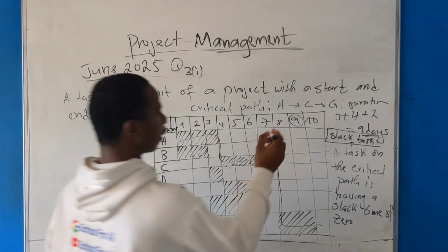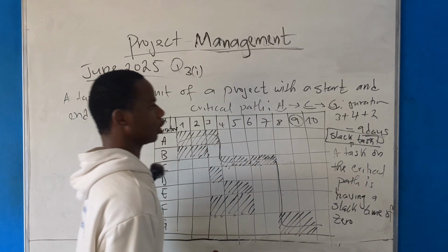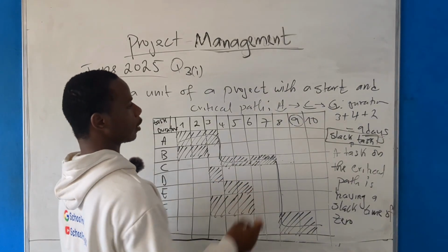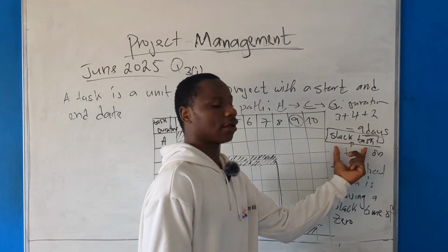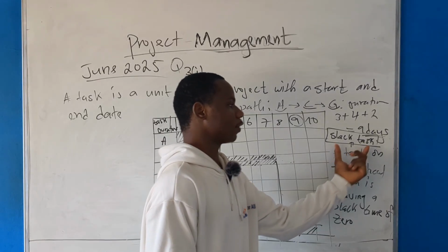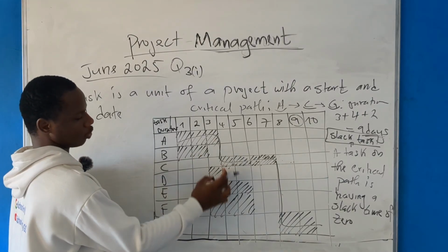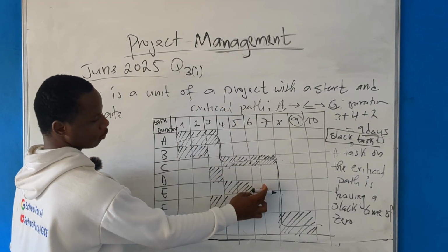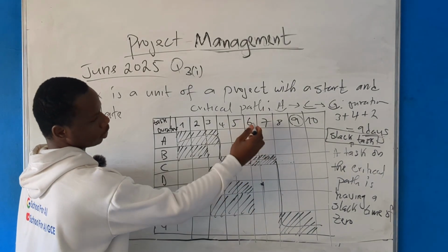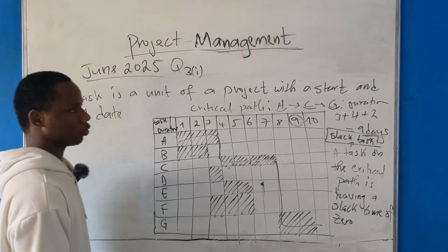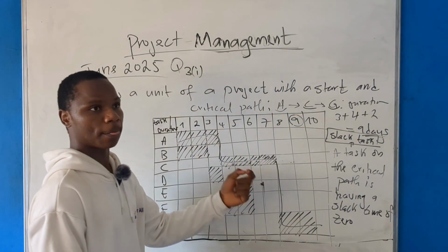So now, since my critical path is having tasks A, C, and G, it simply means that the rest of the tasks are slack tasks, meaning that they can have a delay, like here, this task B. Imagine that B delays for 1 day, it's going to delay E, delay G for 1 day, and G will end somewhere here. And you are seeing that this is day 6, so it's not affecting the duration of the project. So take any of these tasks not on the critical path, you realize it's the same behavior.